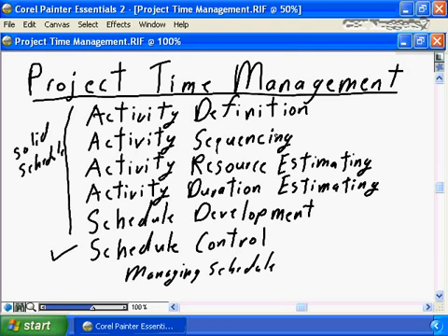It's important to realize that as you apply schedule compression techniques, fast tracking and crashing, you are most likely increasing the risk of overall project delivery. Your original plan is probably the best strategy for successful project delivery. But as the facts are entered in, as the project is beginning to suffer schedule slippage, you may need to increase the risk by adding in these aggressive techniques for fast tracking, for crashing to try to maintain the original scheduled date.